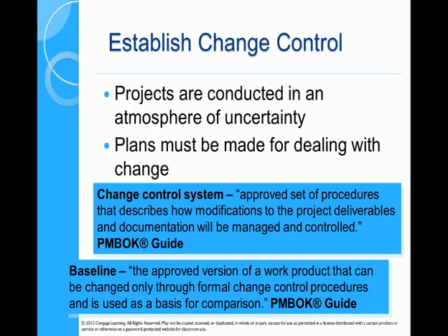So establishing change control is accepting that, from day one, projects change, things will change. There are some things that you can work around, some small things that don't need a formal procedure, but often if there's a change in scope, if you had decided to do a patio 4 by 6 metres using certain materials, but then somebody changes the scope, and there's an example in your handout, and they wanted a new material which costs twice as much, then that's a significant change, and that needs to be run through a formal procedure.